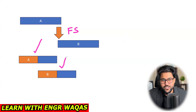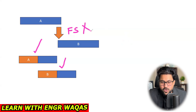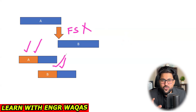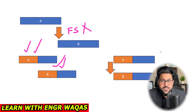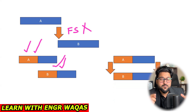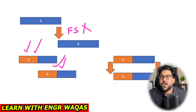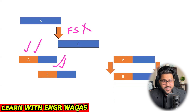Both activities were linked with finish-to-start, but this activity is already started and that activity is also started — this is not logical. In the tracking phase we may be bound to start both activities at the same time, so finish-to-start is overruled. Since both are currently in progress, we can rectify the situation by changing the relationship to start-to-start or finish-to-finish to satisfy the project schedule logic.